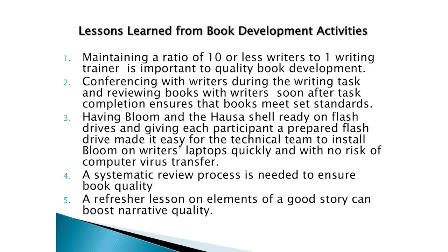We also realized that we needed a systematic review process to ensure book quality, and that was why we did the three stages of review: M&E review, the writer trainer review, and then the Hausa language expert review. So we went through all those three stages for each book that was written. And we also realized that some of the writers needed refresher lessons on elements of a good story so that we could boost the quality of the narratives that were written on the project.